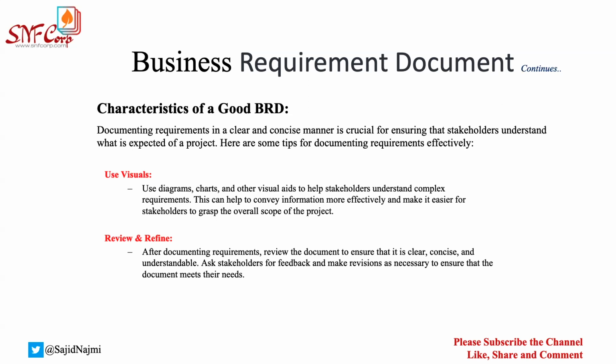And you would want to make sure your stakeholders' and your business's feedback is considered. A stakeholder could be anyone, but the business feedback is very important because they are the ones who will provide the sign off, and they are the ones who are actually accepting that project. So it is very important for you to review with them as well and consider their feedback, revise the documentation, change the language, and then once everything is done, you need to take the sign off from them, and only then can you move forward with the next steps of software development.